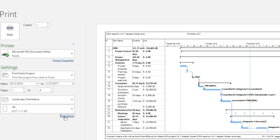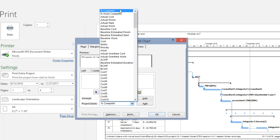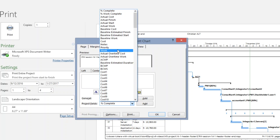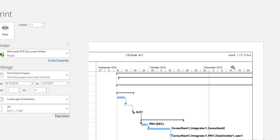Let's see if we can add some other interesting information. Still in the header, on the right I can get information from the project fields — all the available fields are listed here. What is interesting for me is to have the total number of working hours in this project. I've put it in the right side of the header, clicked add, and put the label 'Work:' in front. We now see the work field showing the total number of hours that will be worked in this project.